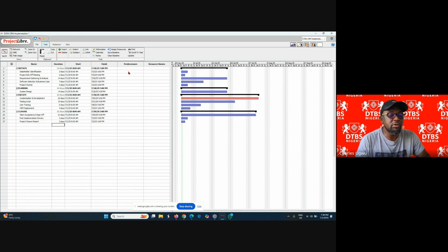Any predecessor? No. Okay, so that means that is number one. So then the next one is project kickoff meeting. And what is the predecessor of the project kickoff meeting? Identifying stakeholders.